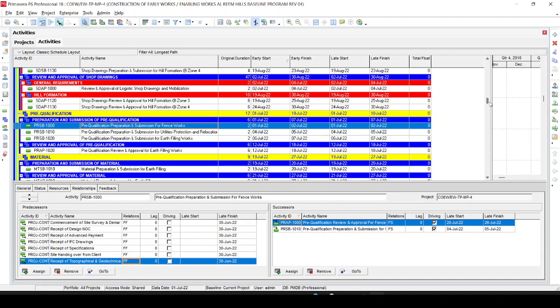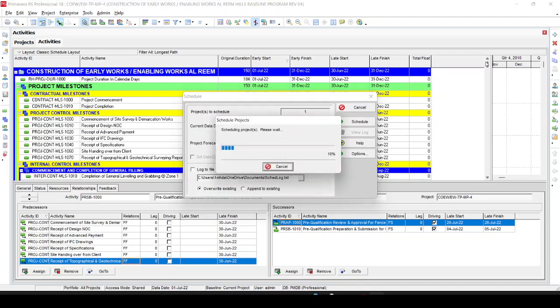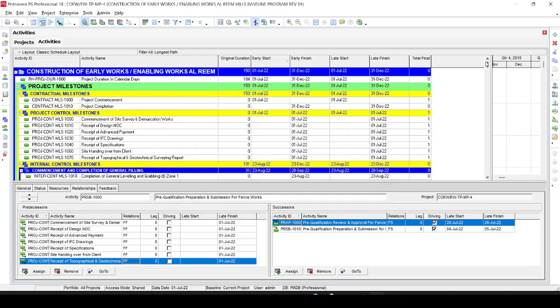We change all the links to Finish-to-Finish and run the schedule again. Now you can see that both critical activities start on the same day — 1st July and 1st July. So by changing the relationship from Finish-to-Start to Finish-to-Finish, the problem is resolved. This normally happens with milestone activities only. When a milestone starts at 8 o'clock in the morning, its predecessor in Finish-to-Start would need to finish before 8 o'clock — which pushes it to the previous day at 5 o'clock in the evening. Changing to Finish-to-Finish means both finish at 8 o'clock, giving you the same date.